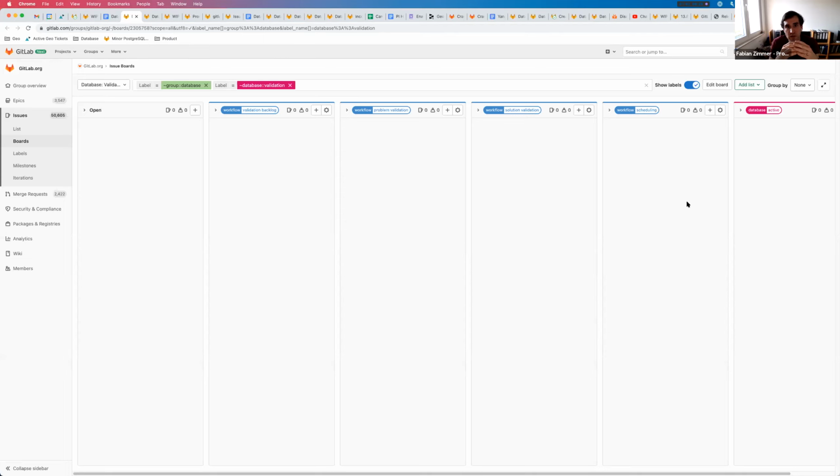But often I prefer working with epics. If we have validated an epic, and we have 10 issues inside that epic, and we understand the epic very well, I don't need to move all of these issues through here. It doesn't make any sense. We just know, okay, the next 3 things can go directly to the build board.